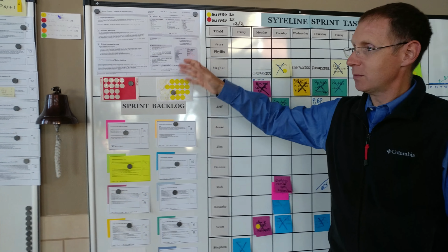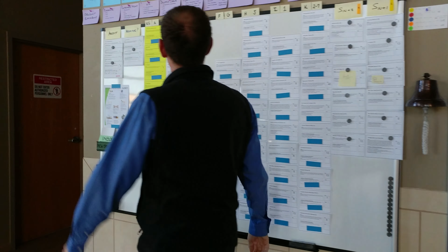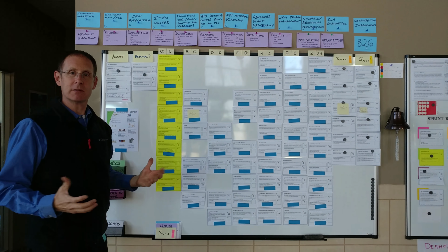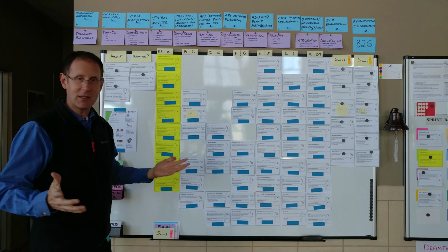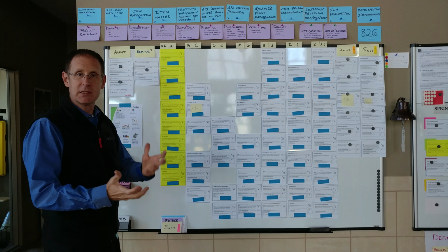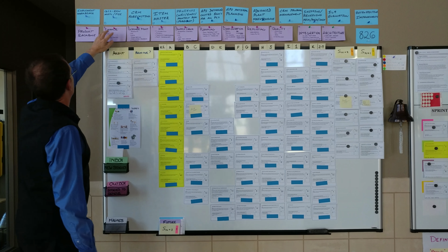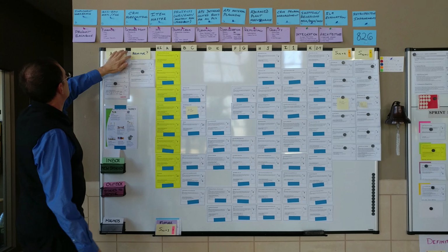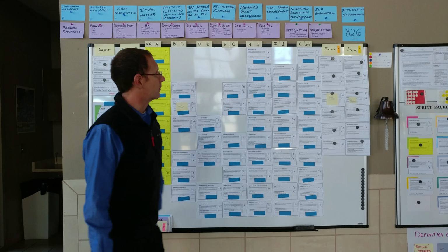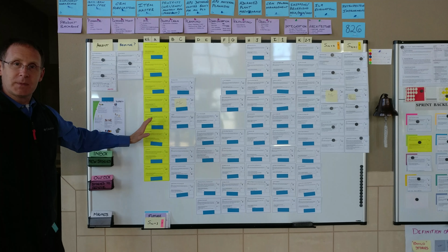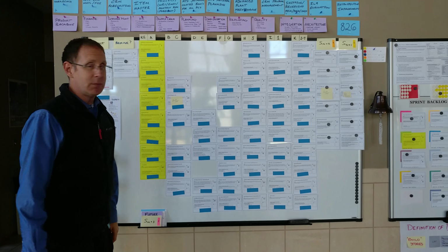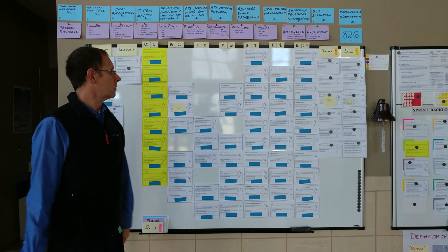From this document then, moving in this direction, they then develop a product backbone. This is a decomposition of all the things that need to be built or designed or coded, tested, you name it, by functional area, by subassembly, etc. So in this case, they're working on modules in the ERP system related to finance and customer management and supply chain and reporting, etc. These cards on the wall represent the user stories, or if you're from a PMI world, think of them as deliverables, that the team has to produce within the current 3-month release.